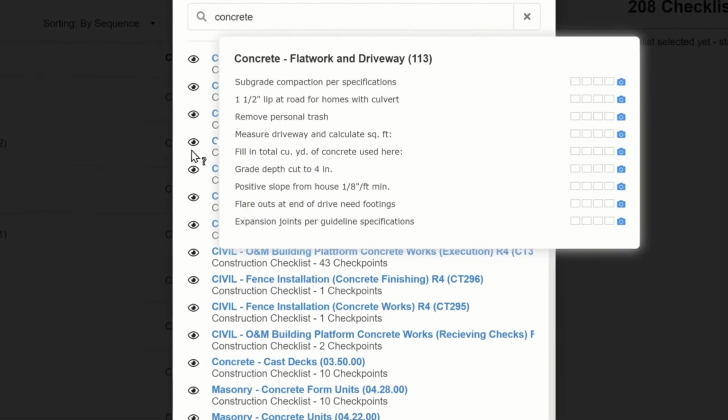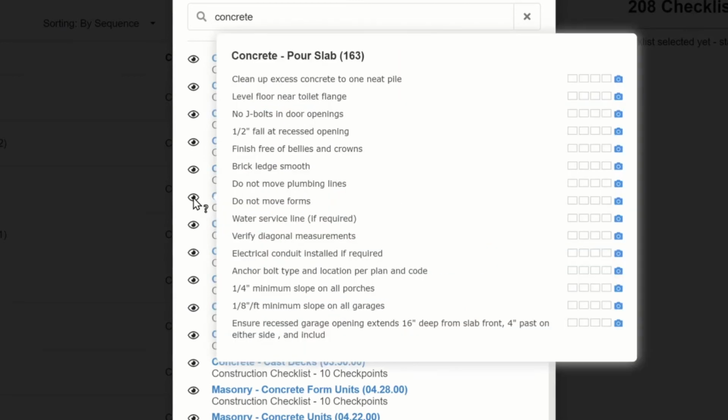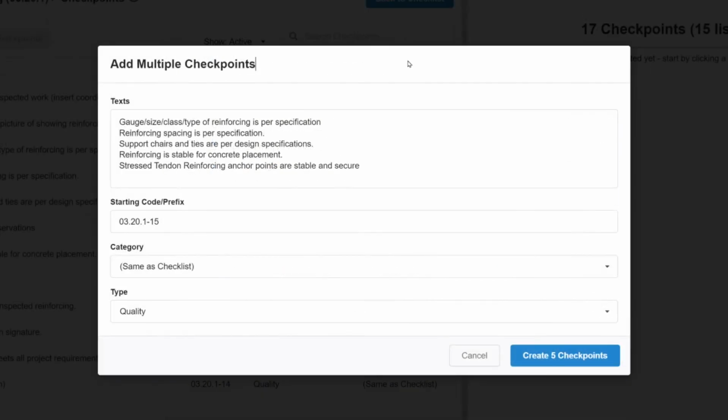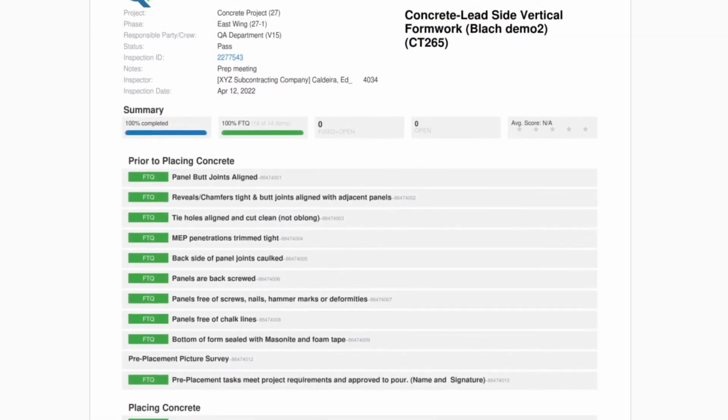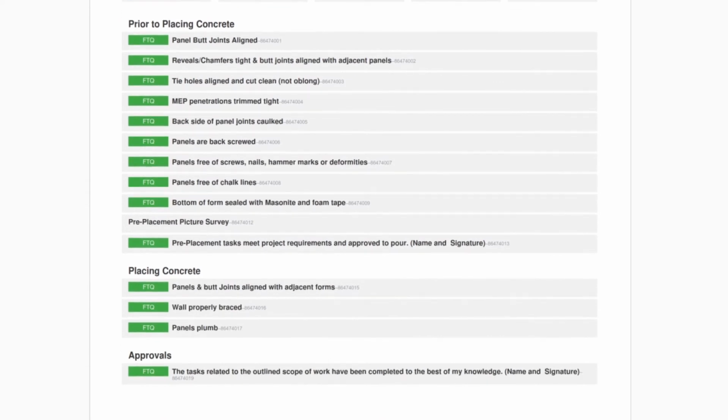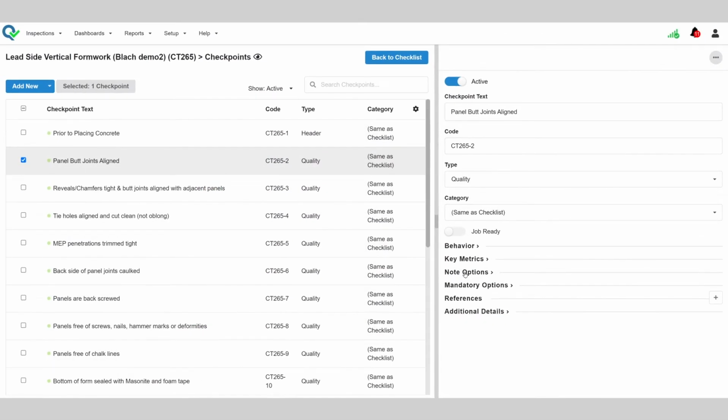Our library of FTQ360 checklists helped give some ideas. The checkpoints were then copied from the worksheet into the FTQ360 checklist templates. During the preparatory meetings, the checks are reviewed and amended with the risks and concerns of the project participants.